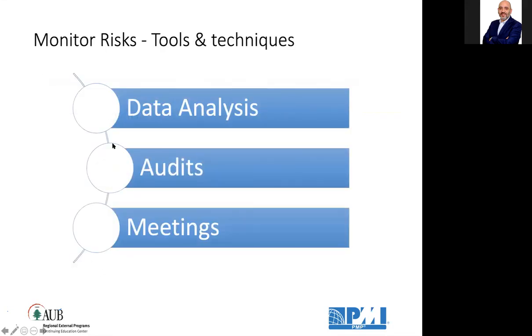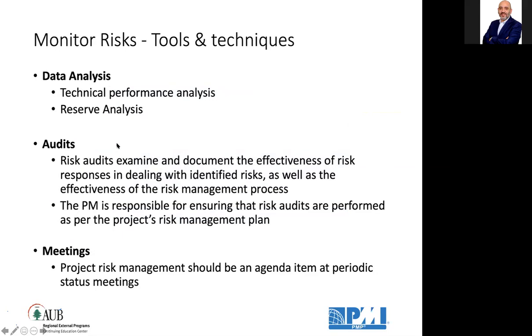Tools and techniques, data analysis, like a technical performance analysis or a reserve analysis. How much is left in the reserve? How much can we use? Which risks should we retire, etc. We can do audits to examine and document the effectiveness of our risk response plans and strategies. And this is where the project manager is responsible for ensuring that risk audits are being performed as per the risk management plan, whether internally or externally to the organization.